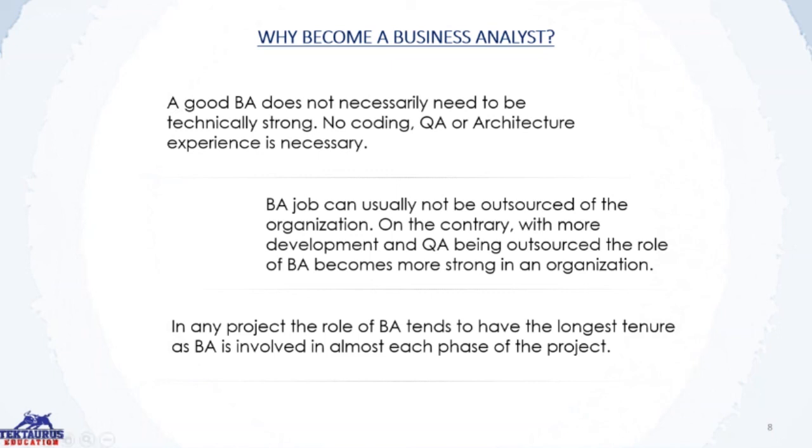In any project, the role of a business analyst tends to have the longest tenure, as a business analyst is involved in almost each phase of the project. As we will see as the course progresses, a business analyst is involved before the project even kicks off. Remember, you have to do the pre-analysis, where the return on investment. Maybe 5 projects you will analyze and only 1 will get budgeted. So you are doing all that work up front before even the development team is involved.